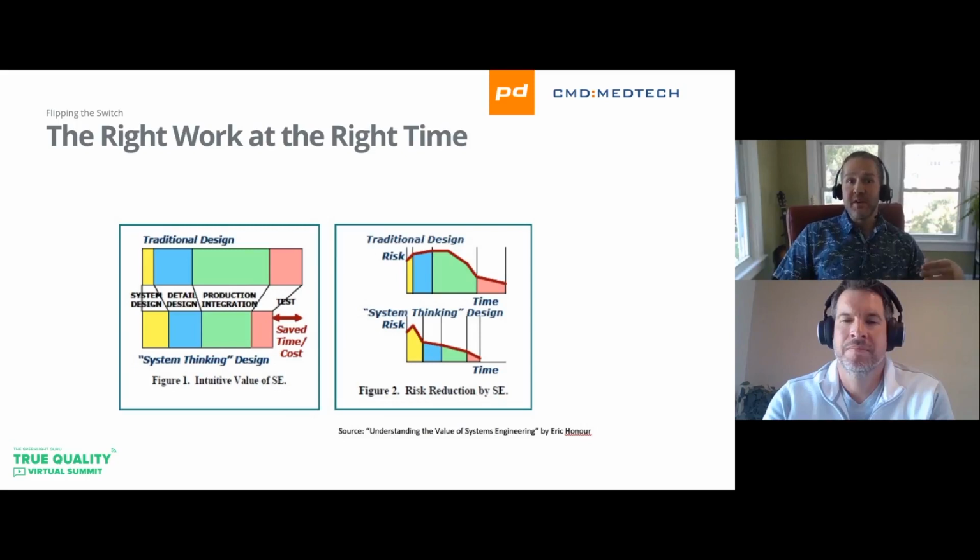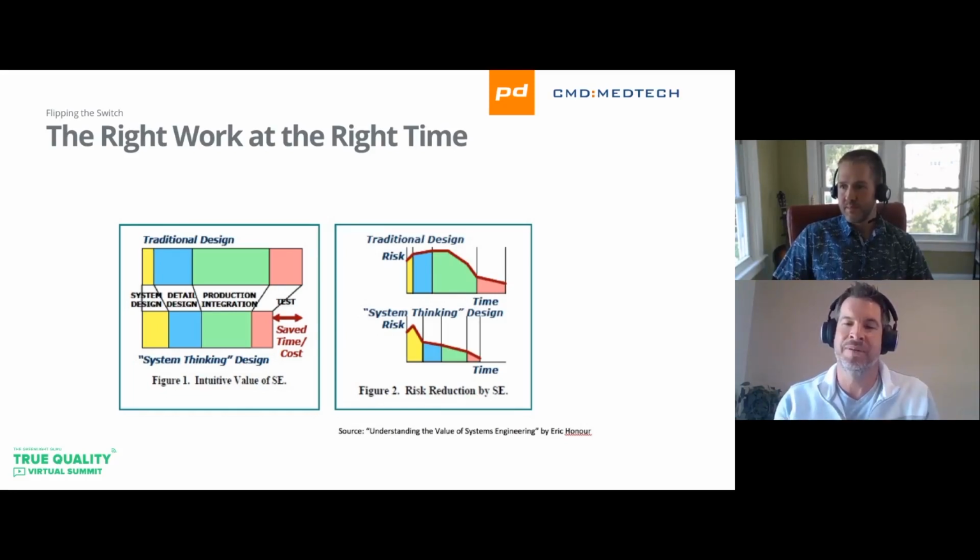So in Eric's paper, he benchmarked a lot of different projects of varying sizes and different complexities and found, with objective data, so objective evidence, that projects that applied more diligence early on in a development effort in mitigating those risks were more predictable and had lower overall costs of development, sort of scaled for the complexity. And it's not just spending more time in these phases, it's spending more targeted, deliberate time in these phases by using those early phases to resolve and mitigate what might later come up and bite you. That's what actually saves the time. So it's not just extended feasibility, it's not just spinning your wheels for longer, it's being very deliberate and tactical about that.